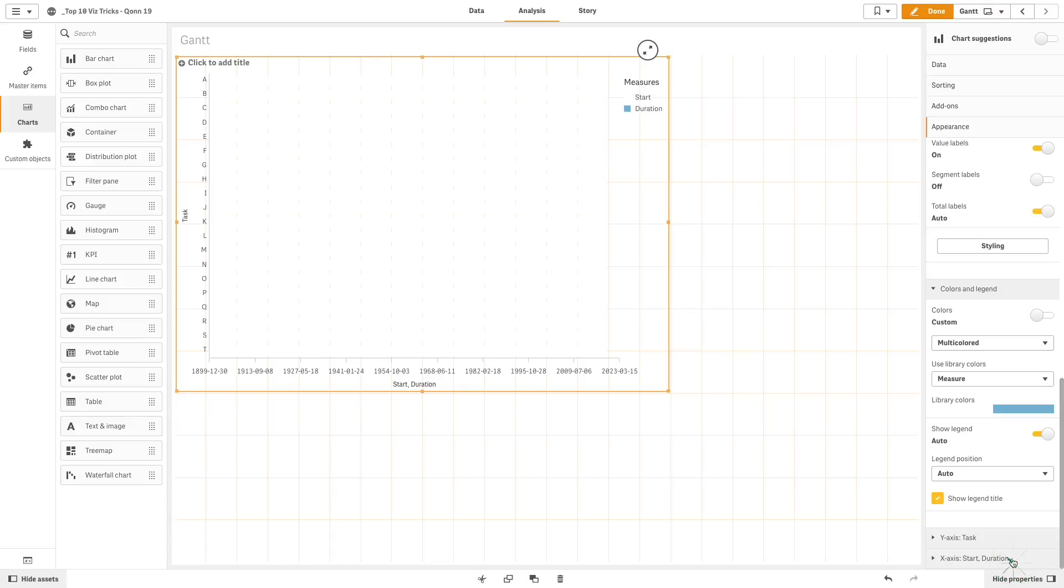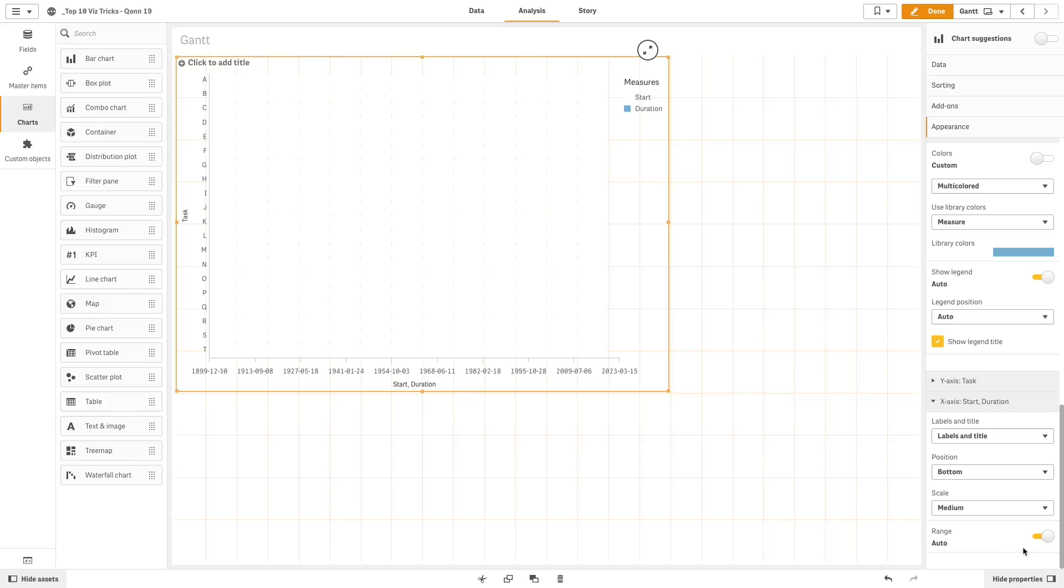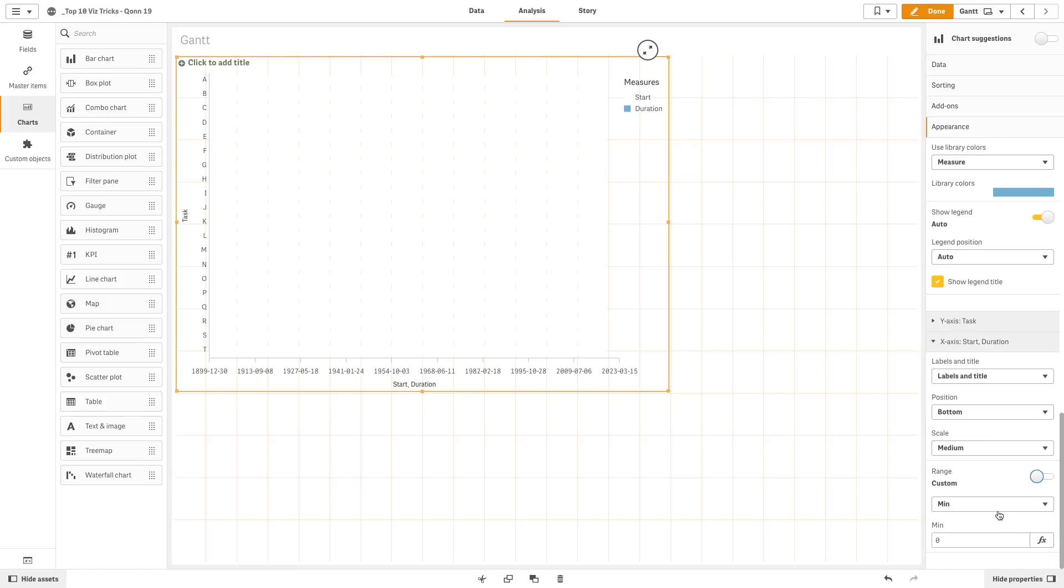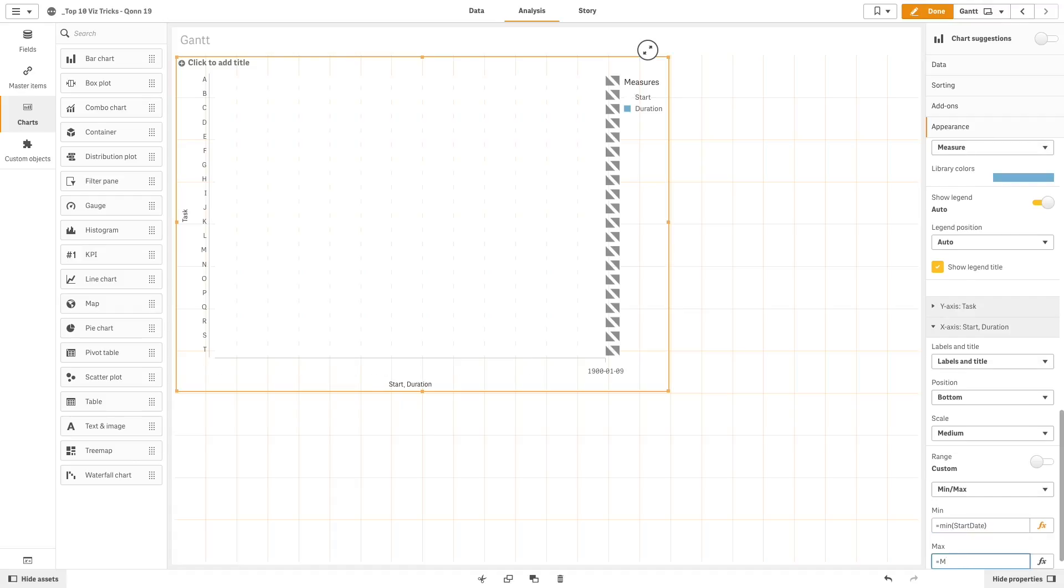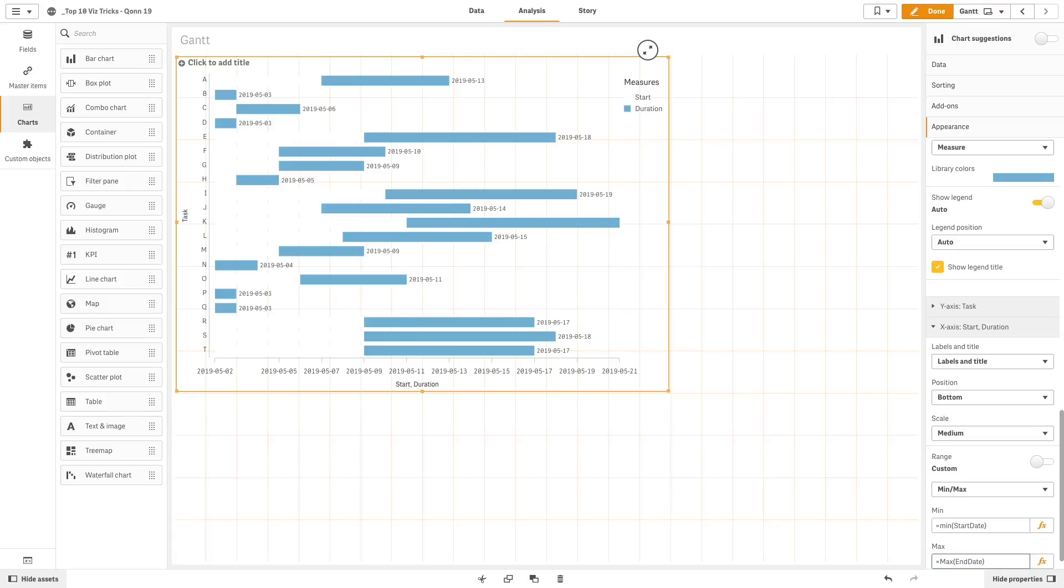Finally, we are going to set the range for the duration. We select the option minimum and maximum. As the minimum value, we select the start date. And as the maximum value, we select the end date.